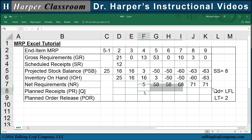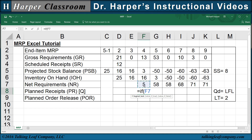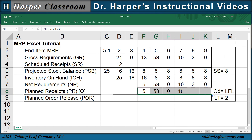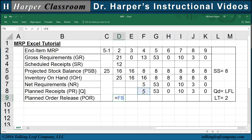Now for the planned receipt, for LFL, that's going to equal: if the net requirement is greater than zero, then we want that net requirement as the lot size; otherwise, we want zero. And we copy that over. Since the lead time is two, we come back two, and our planned order release is going to equal our lot size. And we copy that over. There's the MRP for lot size discipline of lot for lot.